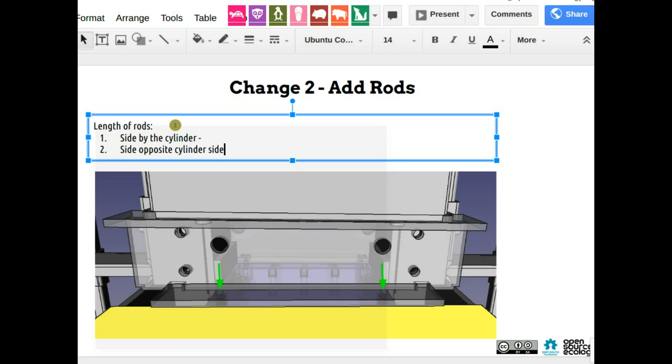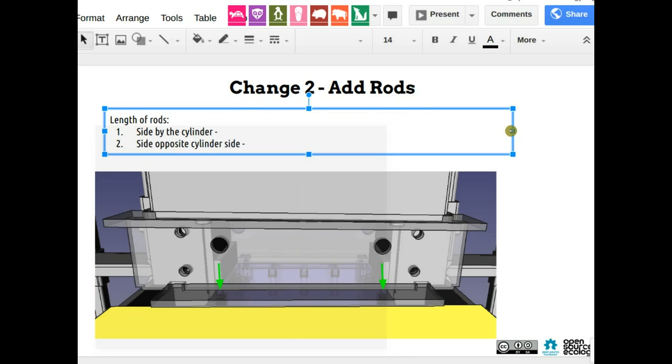And the other thing is, my part will probably be the last because I have to wait until I know the exact measurement of the holes. Is that correct? No, the point was the opposite. We can parallelize it because the hole's going to be moved, but that's equivalent to moving the rod too. Those tasks don't need to depend on each other. You just move it to the bottom, as far down as it will go on that piece.